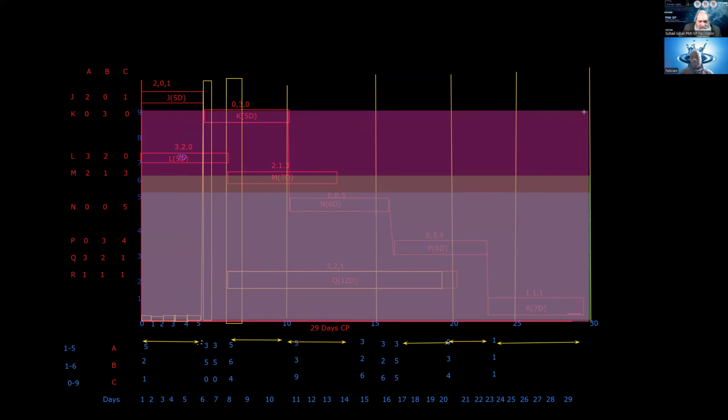If you do that, you are probably doing what you are doing in your projects. But this is the most inefficient use of resources, because on the days A will not be required, you will be paying him unnecessarily. You are going to pay all your staff for the whole duration of the project. Whereas, let us see how much they get used. Let us say A, let me only draw the A bars.